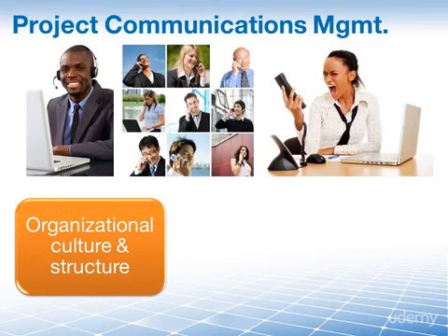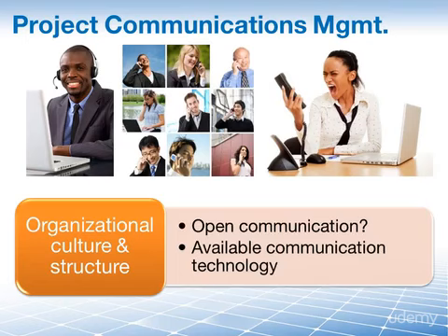We can see how an organization who practices very open communication would be very different from an organization who has a very secretive and restrictive communications policy. Your company culture or structure may be that you as the project manager are not allowed to communicate directly with the employees. This has to go through, let's say, the department heads or the heads of communication.